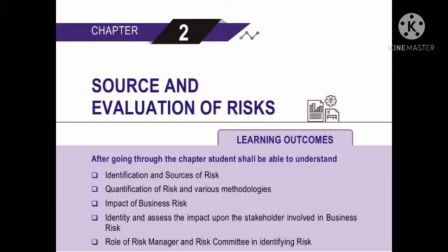Example: level, likelihood, description. 4, very likely, happens more than once a year in the industry. 3, likely, happens about once a year in the industry. 2, unlikely, happens every 10 years or more in the industry. 1, very unlikely, has only happened once in the industry.